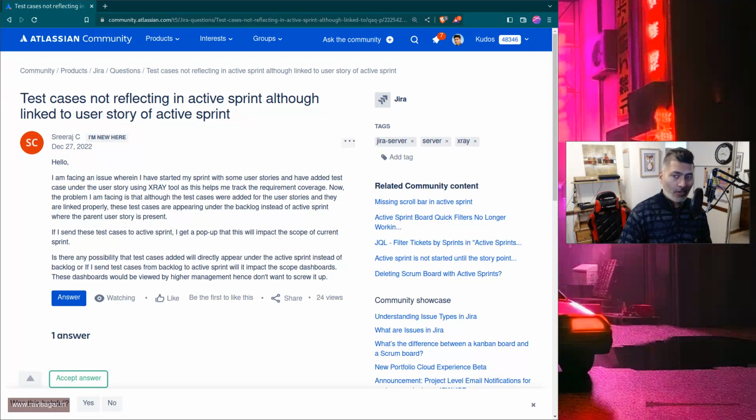Sometimes, and this happens a lot, people just create a story for performing testing. And that is totally okay, because within that story you can have some subtasks, or maybe you want to have a major activity called testing in the beginning that you can create with some estimate. And then you can, of course, track it with some story points. And that will contribute towards your burndown chart. Whenever you are performing testing, you're burning something, right?